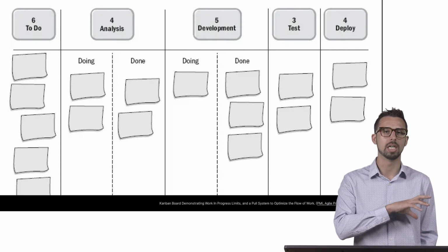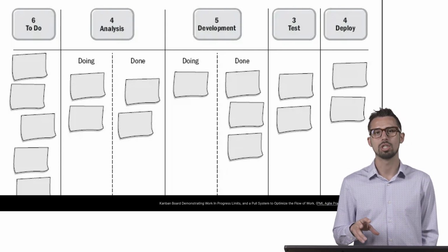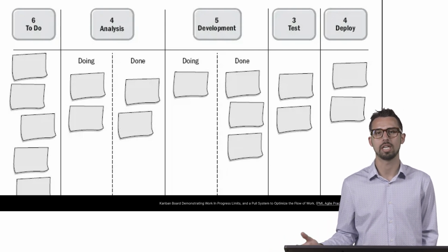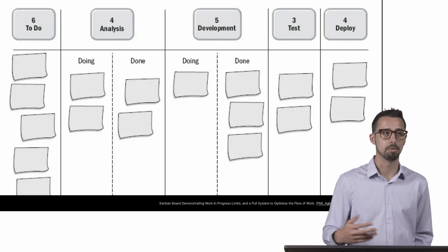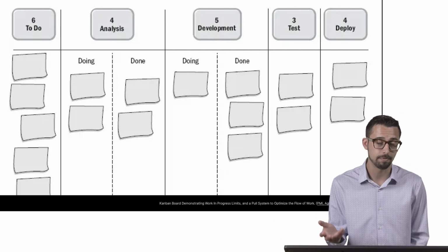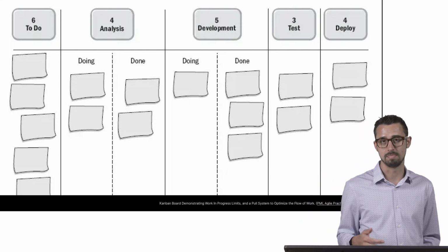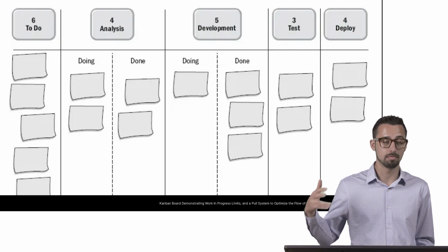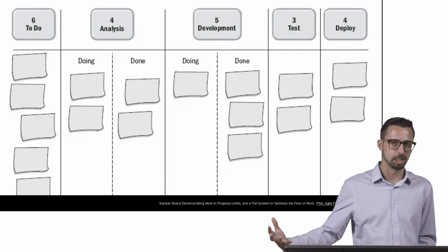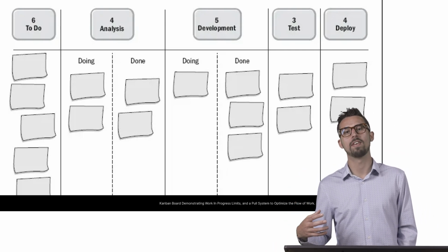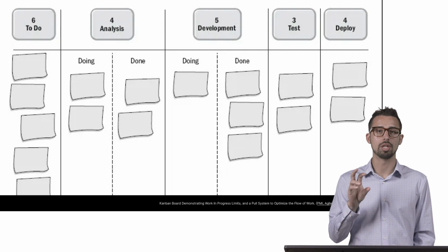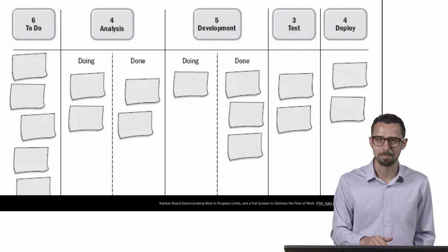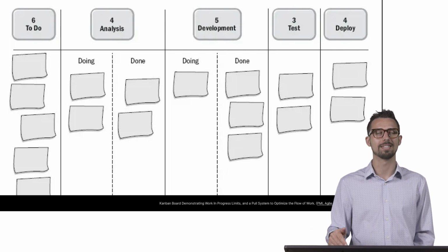Kanban boards can provide very clear insights into a project's workflow, the bottlenecks that are getting experienced at any particular stage in the process, any blockers, and just give an overall status just by looking at it, which can be really helpful. Additionally, the board acts as, similar to Toyota, an information radiator to anyone who sees it, providing up-to-date information on the status of the work of the team. So long as the team remains responsible about updating their task statuses.